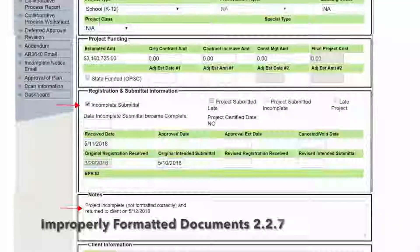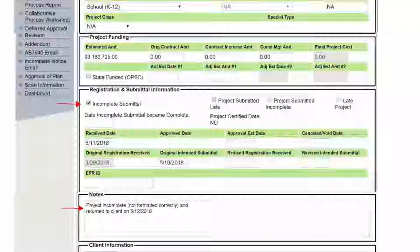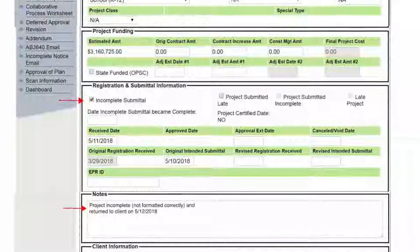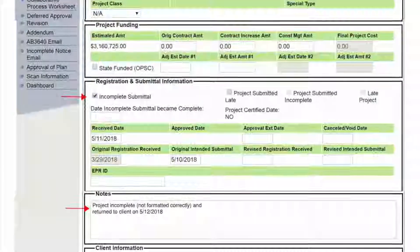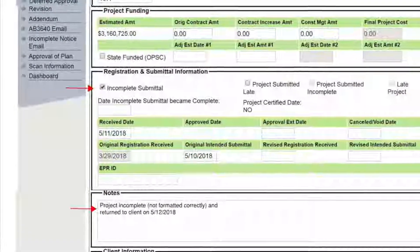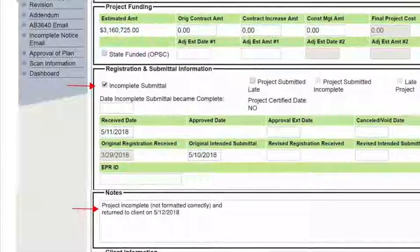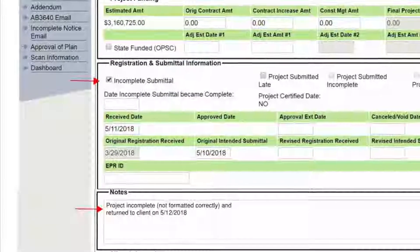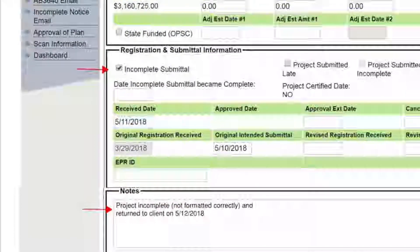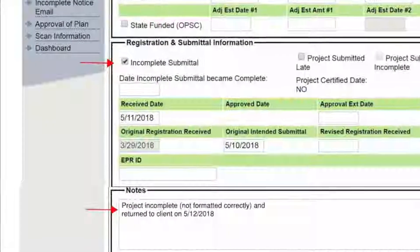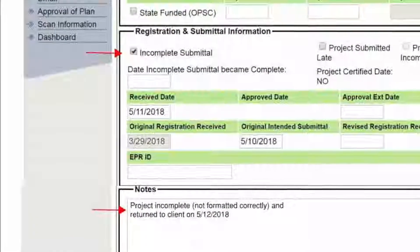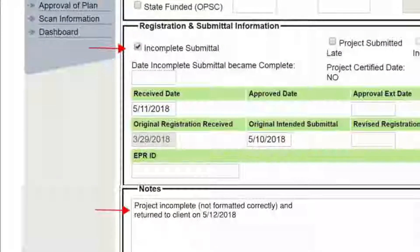If documents are not properly formatted, email the design professional to resubmit documents within one day. If documents are not submitted, update the eTracker application screen: check the incomplete box and add the following note in the client customer notes section — project incomplete, not formatted correctly, and return to client on. Issue an incomplete letter to the school district owner and copy the architect and engineer stating the project is incomplete.